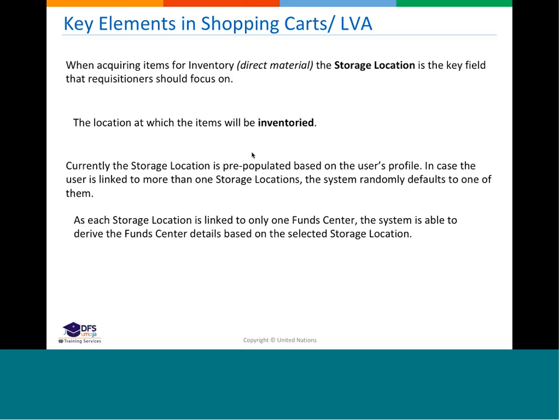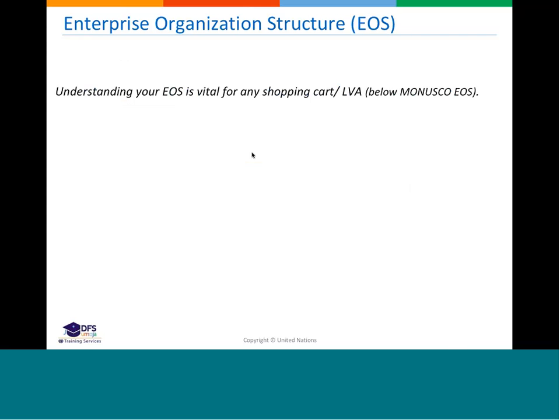Selection of the storage location will trigger automatically the fund center that is linked to it. So you don't need to inform the requisitioner what is the fund center. Just by letting them know what is the storage location, the fund center will populate automatically.